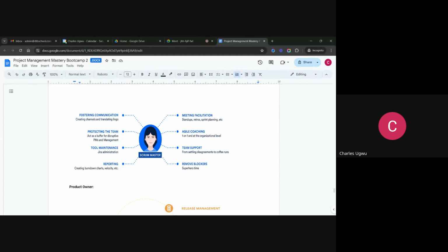It's not something you send by email. If you are not working remotely, once you come to the office, everybody logs into their computer, and you have a meeting point. You cannot relax at your table; you must agree on a meeting point where people assemble to have that meeting. It's a 15-minute meeting, so it's not going to take time, and everybody will talk through what they are doing. According to Scrum, the Sprint team cannot be more than 10 people, so the number is not too much. Even if there are 10 people, everybody can quickly give an account of what they are doing within 15 minutes and wrap it up.